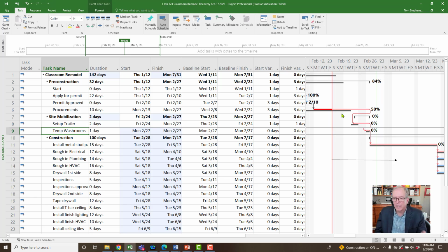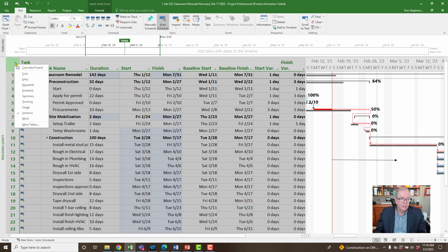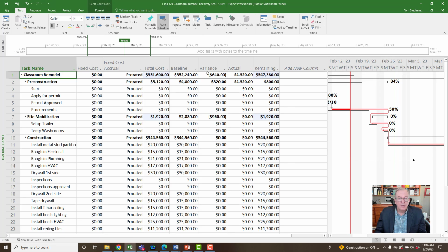So we had a few little hiccups, but these were minor things and we were able to fix them pretty quick. And these aren't going to be things that cost us extra money. Speaking of which, how does this affect us money-wise? That's another question. If I go to the variance screen for cost, I see, oh, I'm ahead money. I'm actually ahead money. How is that possible? Well, it's likely because of how you assign the resources, and you have variable resources, variable costs.